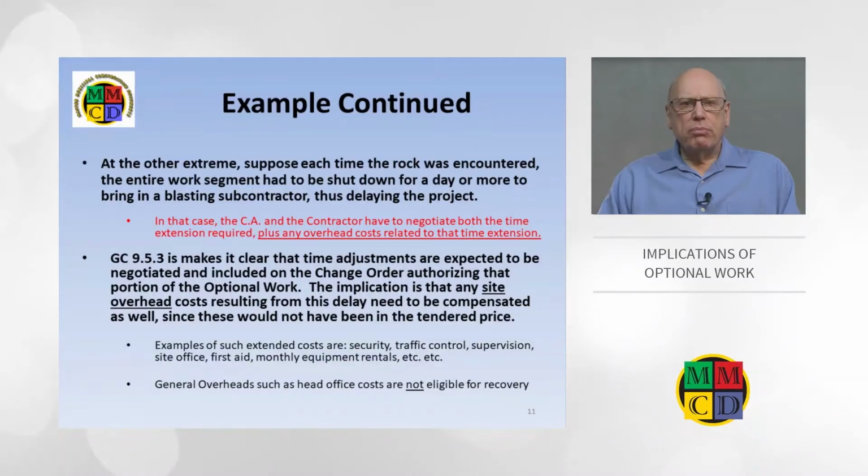But there is a major implication to this. If the schedule is extended, there are daily site overhead costs which will be extended and must be reimbursed too. These would not have been included in the bid price because the owner would not wish to see the project schedule extended on speculative terms. Or, if the schedule was initially fixed, the owner would not have wanted the bidder to include acceleration costs for speculative delay days.